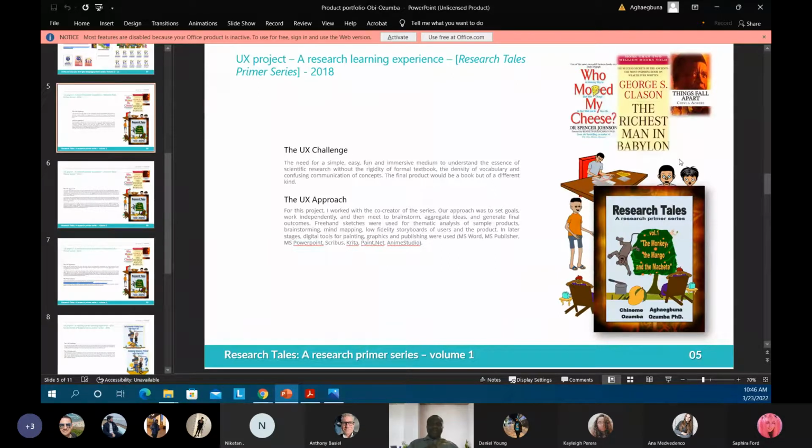But the main thing is, what I've learned there is this: having the project mindset, mapping the stages, determining who the key stakeholders are at each stage, and finding out the kind of information and the way you should fashion that information to feed them, so that when you need those decisions at those gates, you have those things. And there's compromise here and there so that you can move forward with them. They would agree to also prepare themselves, because part of this project is also upskilling staff to be ready to deliver on the new curriculum once it's done.